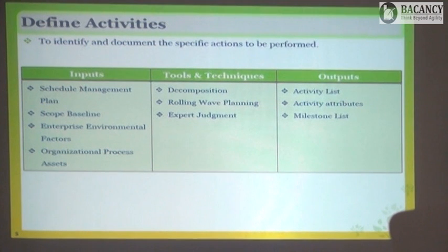Going will take 1 hour, coming back will take 1 hour. Since we are doing these activities in parallel, the travel time will be common for both activities. The additional time will be what you spend in buying spices, isn't it? That too based on the availability of resources. You can define whether you want to send 2 resources or 1 resource.